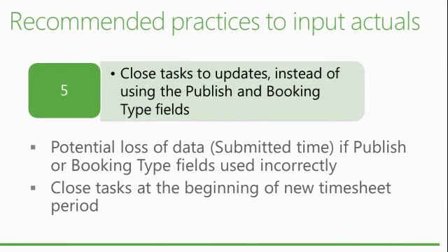When you publish it, yes. Because when you publish, it's going to actually calculate everything in the time phase value, and this is where it's going to update all the tables. And it's going to take more time if you have very long duration and a lot of resources, because each task becomes a lot of workload, basically, to be able to cut all this time period by the unit that is stored in the database, and for each of the resources that is part of the task or the project, yes.